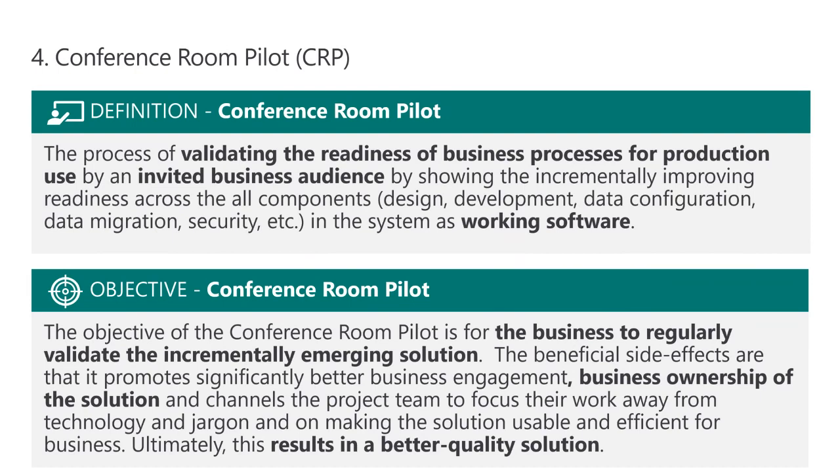Here's where I'm showing you how this works. Here's where I'm showing you how that works. This is being shown from within the software as a working process, right? It's not always complete. It's not even always bug-free. It's not always even all polished, right? But the idea is that you're getting your invited business audience to say, yeah, you're on the right track. That looks like it will work for us in production use, right?